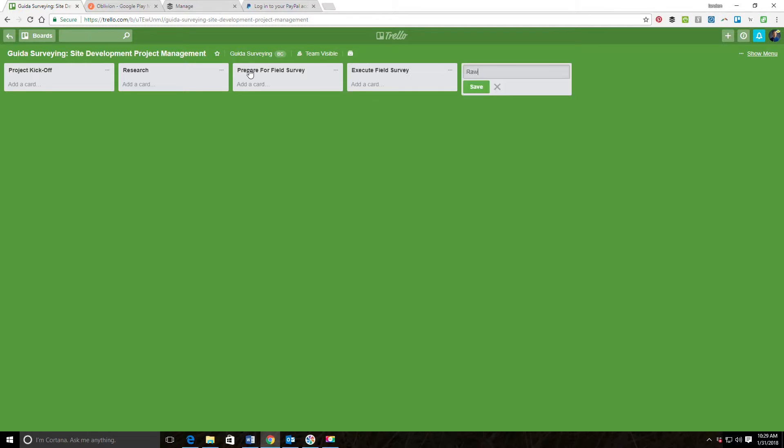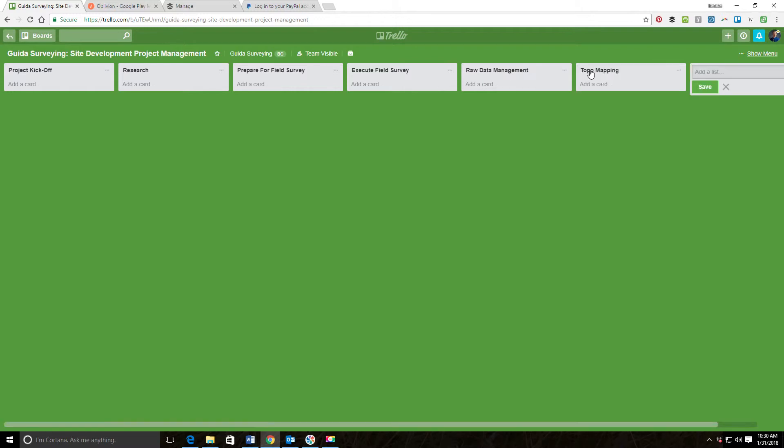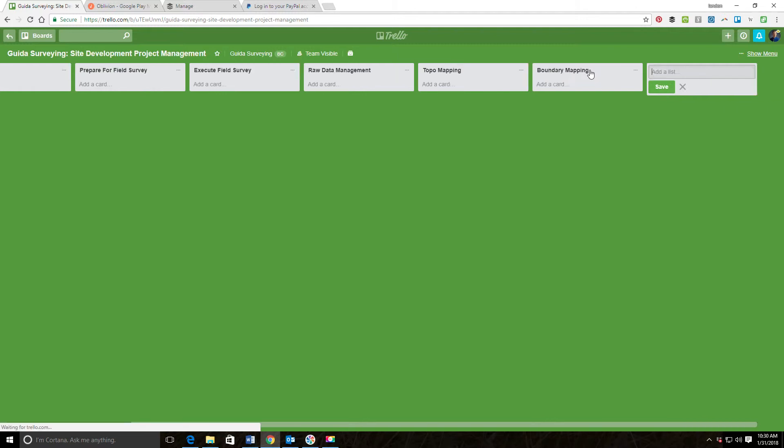Then I have what I call Raw Data Management. In this step of the workflow I'm processing my raw data and doing any adjustment that's needed. At this point my process typically will diverge into two paths, so I'll have one surveyor working on the boundary part of the project and we'll have a survey tech that's working on the drafting. I'm going to do the drafting things first, so we're going to do Topo Mapping, and we'll have another guy doing the Boundary Mapping.